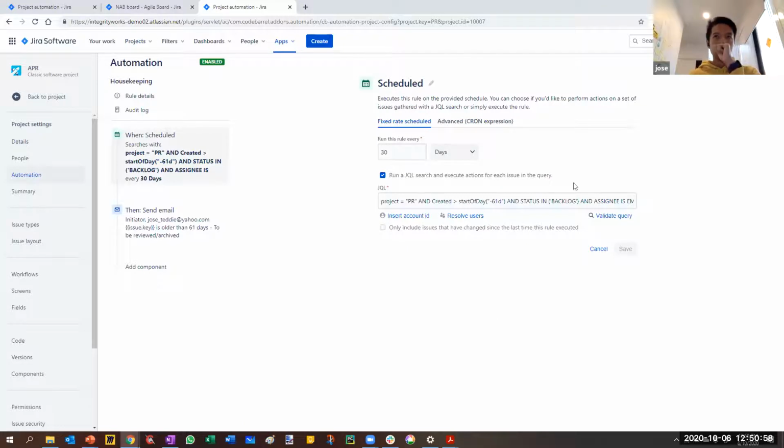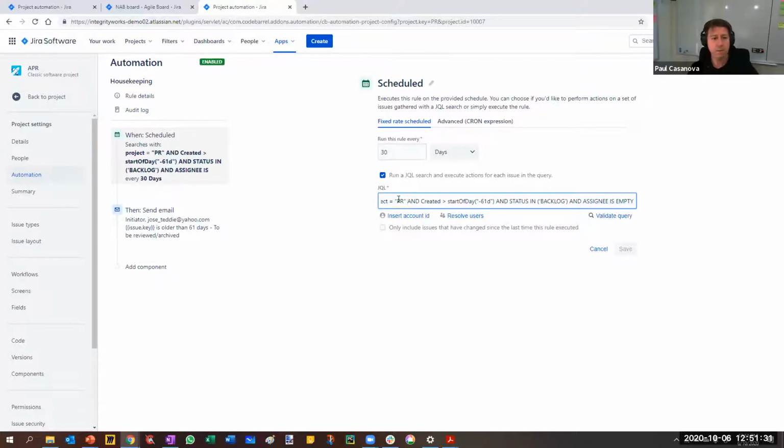Yeah, it's basically... So this is an automated run every 30 days, and it will pick up any issues in the backlog the past 61 days. Sorry, 61 days ago, older than 61 days ago. Yep. And the status is in backlog and there's no assignee at the moment. Yep, okay. Yep, so that's the first step. Awesome. And is that PR or APR? Yeah, that's the code value for APR project, I think. Oh, okay, no worries.